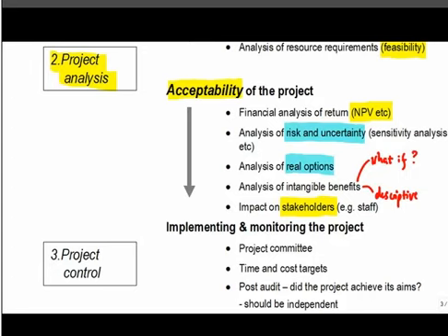So it's important to remember that with intangible benefits, you can attempt to say what would have to happen to sales in order to pay off the project. Without saying what sales are going to move by, you can at least describe what would need to happen in order for the project to pay for itself. Alternatively, or in addition, you could describe the benefits of the project without putting a pound or dollar sign at the end of your description.